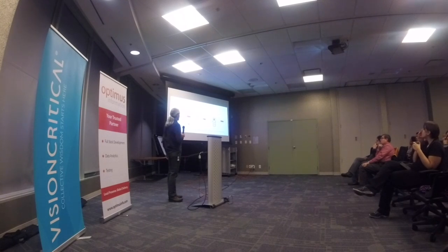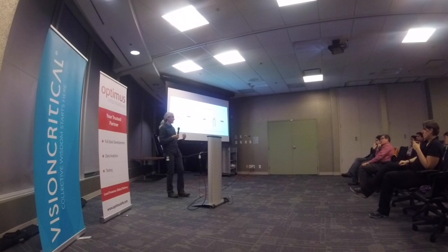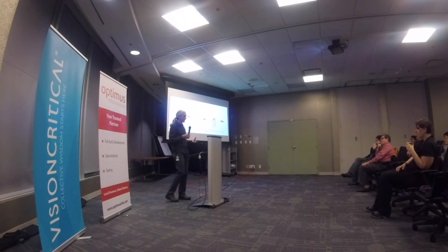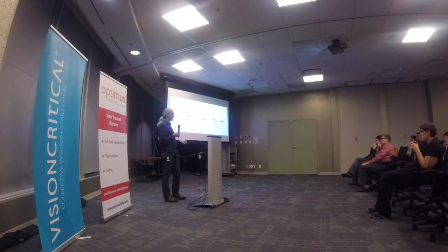Right? And so the problem I've got now is I've got 3 areas of high risk and 2 areas of medium risk. So now I've got to do some more work to say which one's the riskier of those things. And I'm going to ask questions about what's changing. How much is changing in the client browser and how risky is that change? And how would I categorize or understand that change in the sense of how likely it is to happen and the impact of it.